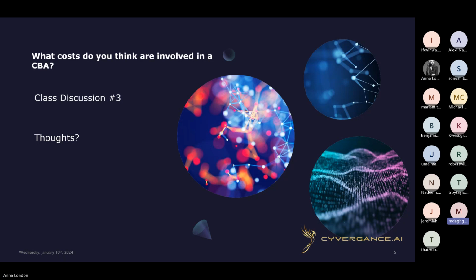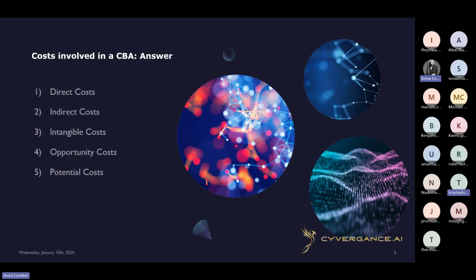I would say it depends on the cost to get the tool, the implementation cost, how much it would cost us to run whatever solution we're going to run in our company, and then maintenance cost afterwards. Yep, exactly. And breaking it down further, there's direct cost, which includes direct labor involved in manufacturing, inventory, raw materials, manufacturing expenses, and a lot of other things. And there's indirect cost, and that could be electricity, rent, utilities, overhead, also data center costs, telecoms costs, and stuff like that.